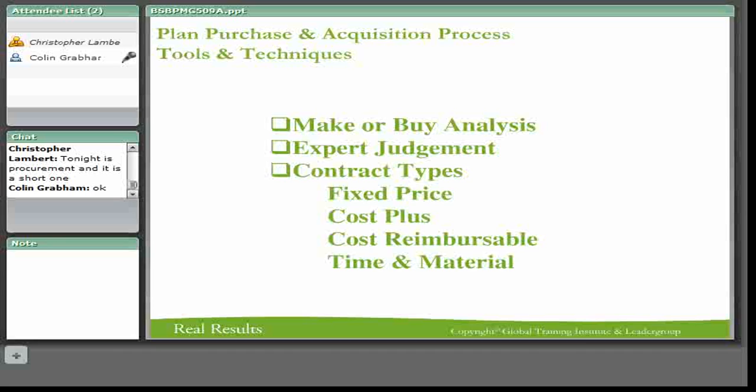What you're doing is you're allowing someone to tender for a price or quote for a price. And you're saying, well, if it's a fixed price and something goes wrong or needs more time, then it's not your risk, it's then the vendor's risk. Right. Then there are some others that I've actually used. I've used cost plus something.